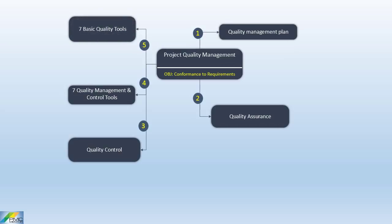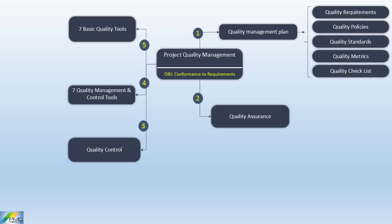The first key concept is the quality management plan. A quality management plan is a component of the project management plan. It describes how the organization's quality policies will be implemented and how the project team plans to meet the quality requirements for the project. Quality metrics and quality checklist are significant outputs from planning processes and will be used in quality control and quality assurance respectively.